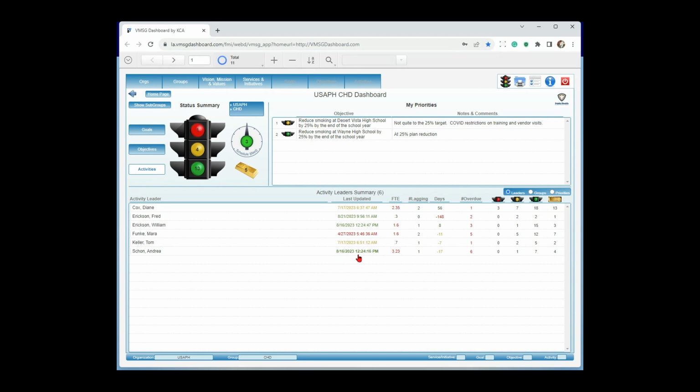The reason this is critical is because ideally you want to work with real-time updates on everything. The green indicates less than 30 days ago it was updated. The yellow indicates 30 to 60 days, which, by the way, could be okay. It means maybe at the end of the month somebody was on vacation when the email came out to do the update, so they didn't get it updated. The red, however, indicates it's over 60 days, meaning they've gone through at least a couple of email cycles and not done their update in here. So again, it might be worth a chat with Mara to just say, hey, what do we need to do to train you to get back on track on keeping your information up to date?